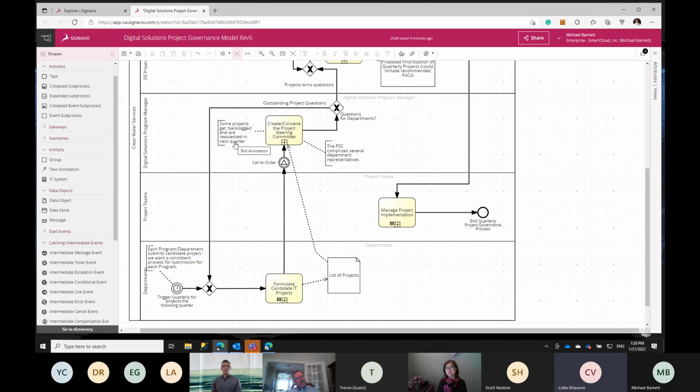So the other thing is the project list, the definition of a project. This is more of a 40 hours or above, I think 20 or 40 hours or above. So we're still having that general thought. My plan is to leave the team enough time to work on the support requests that take less than 20 hours. Those are the items we will be managing more on a daily and weekly basis. This is strictly the more complex projects, which require multiple departments.